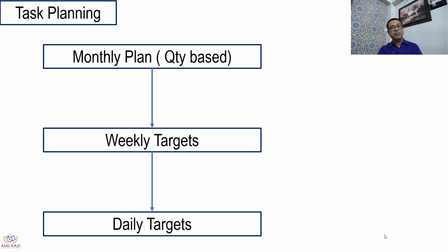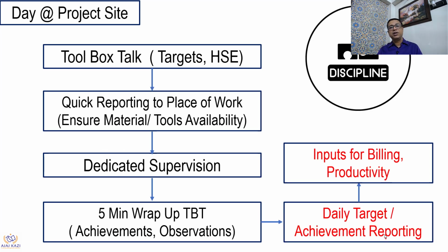From that you can derive the weekly targets. From that you can derive the daily targets. Every toolbox talk you should have targets and the HVAC related. You should quickly go to the site. It is very important to have dedicated supervision to get the right safety and the right target with the right quality. If you don't have that, you will have misses, and that will create a lot of problems.